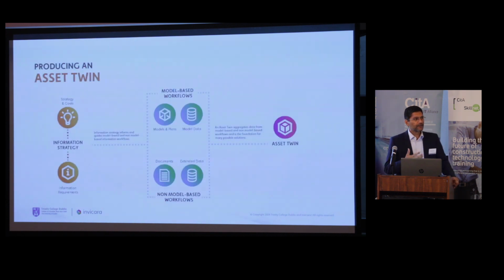Now, there are two sets of workflows that we've employed on the project. One set of workflows is around model-based data. So the information that can be stored and delivered within a Revit model, for example. There are many technical challenges that we need to be aware of. We are involved in an airport project now where there are 8 million pieces of data specified by the project. When we got involved, 8 million pieces of data was the count. Number of assets that the client cared about, the number of instances of those assets, and I think 160 parameters, many of them duplicates, were all specified.